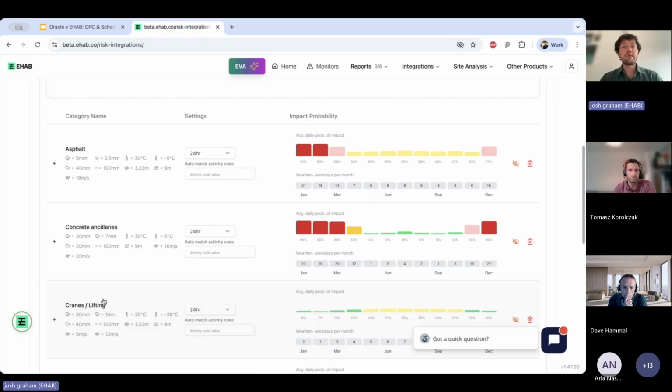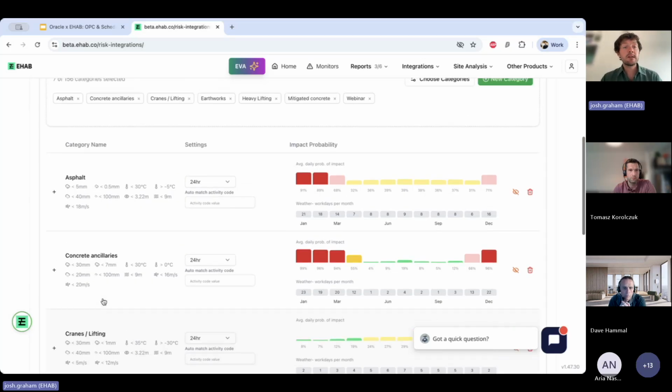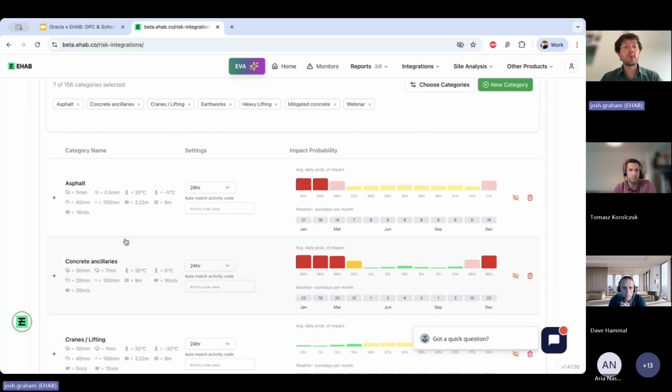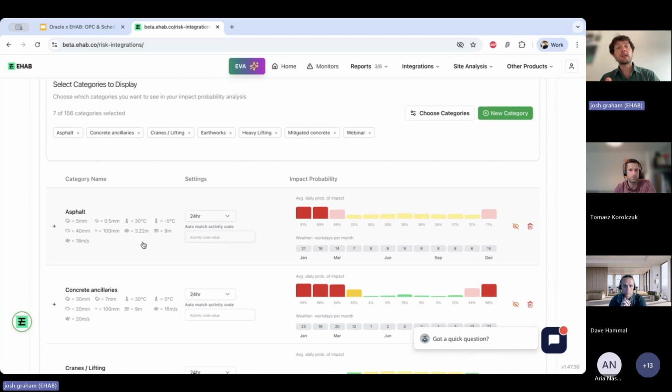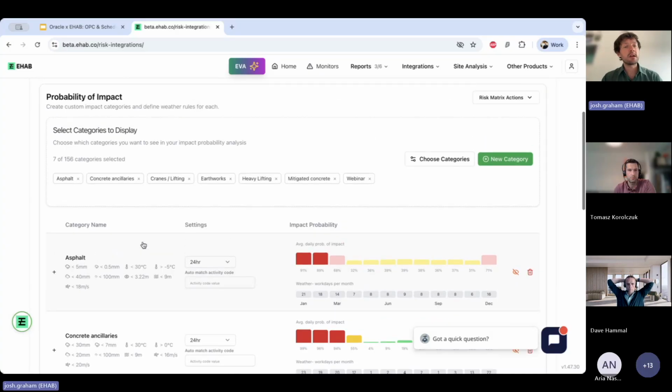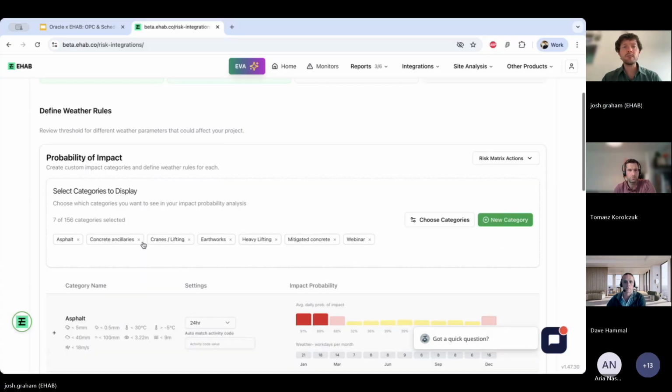So, if, for example, you, Thomas, were running a risk workshop with your client, this is where I would suggest that the most time is spent, just because clearly this is what can have an impact on the result. And some of the exercises that we've done with clients in the past is they might have a pre-mitigated, a post-mitigated, and several different sets of risk matrices that they can then do different analysis with, and compare those rules and what those mean. So that's the second step.